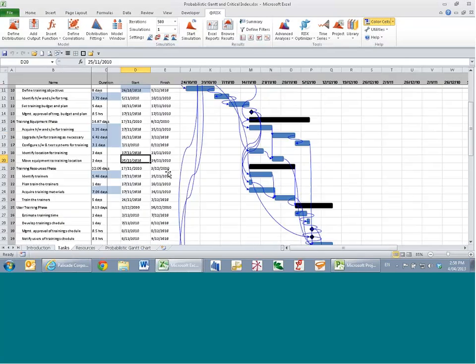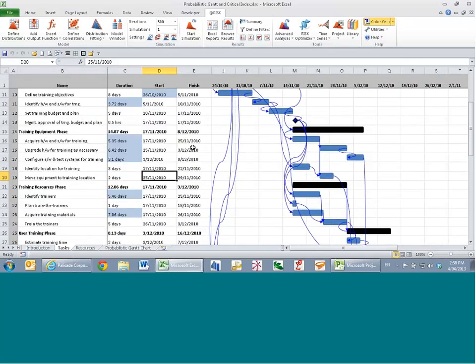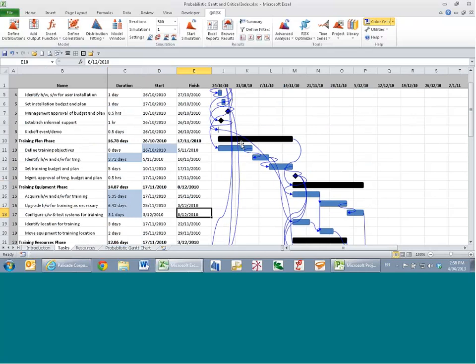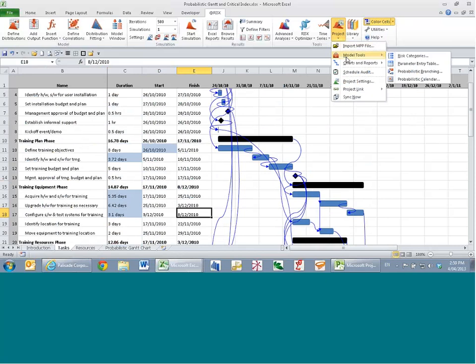An extension to the idea of criticality is that of cruciality. Cruciality takes criticality one step further and says that something might lie on the critical path, but maybe it only adds a total variation of 1 day, total maximum impact, to, say, a 5-year project. So even though it's on the critical path, it's not actually that important. So one way of measuring that is with cruciality.